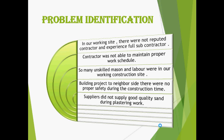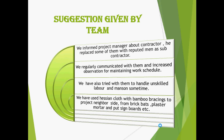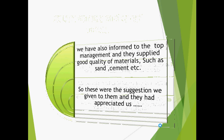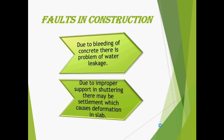In our project there were some problems identified along with suggestions, which were accepted by the higher authority. No construction is perfect — some faults may occur. The two major problems faced were due to bleeding and due to improper support in shuttering. You can see how bleeding occurs and what the effects of improper shuttering support are on the slab.